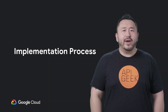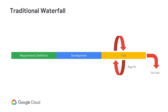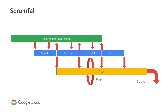Now that we have a good grasp of the fundamental strategies and tactics of adopting agile, let's discuss the process of implementation. Here's the familiar waterfall process — long releases with lengthy stages and big handover points, often from one team to another, with risk and unknowns unsurfaced until we get into that particular stage. Teams that move away from waterfall have a tendency to move into scrum fall, which breaks work into sprints and starts testing cycles early. However, because testing is separated as a post-sprint activity and not included during requirements definition and sprints, testing and bug fix time is elongated and long release cycles invariably happen. With API development, we can definitely go further than scrum fall.